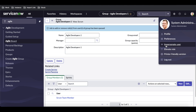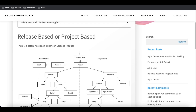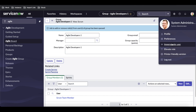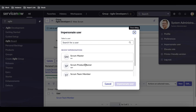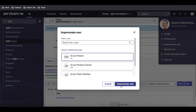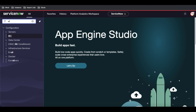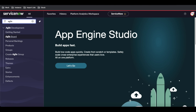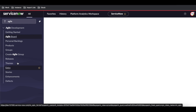Once our theme is created, we need to define the epic. Who can define the epic? The epic can be defined by the Product Owner or by the Scrum Master. So either the Scrum Master or the Product Owner can create epics. I'll impersonate the Scrum Master and go to Agile to create the epic.